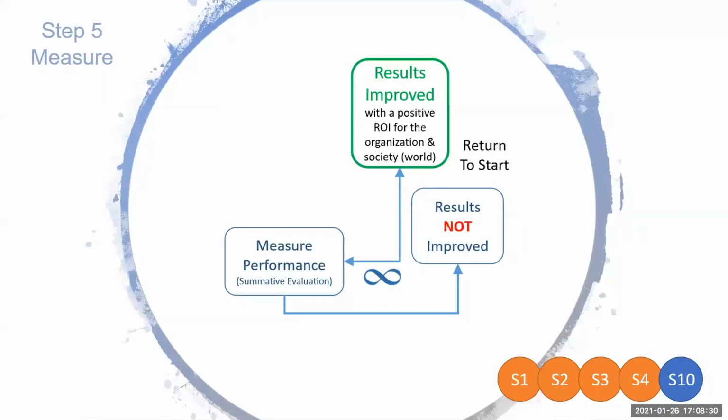We started applying project management. We strengthened the ISD approach that was being used. We changed how the developers were doing their work internally. And we changed how we worked with the subject matter experts. And after we did all that, we were bringing the same size of projects down to 6 months in time.